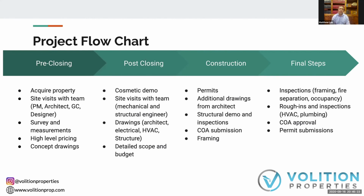exploiting with the city. The city is well aware because when we go to committee of adjustment, we tell them what we're up to. We tell them we're trying to get to 4 units. These are the variances we're looking for, and we'll do it through a phased permit process. It's not something we're trying to hide. It is fully above board with the city, but the city understands that we are doing this process because development charges are meant for large buildings, which are actually putting strain on city resources. So they need those tax dollars so they can upgrade those city services.